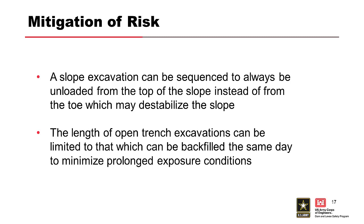A few examples of specification requirements that can be used to mitigate construction risks include sequence requirements — for example, requiring a slope excavation to proceed from the top down instead of starting at the toe, which could lead to destabilizing the slope. Another example is limiting the length and duration of open trenches. A third example is video inspections of drain pipes during installation and right after backfilling around the drain pipes, which has become a pretty standard practice in the industry.